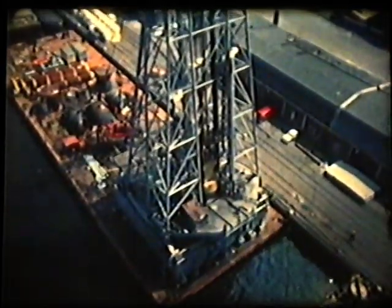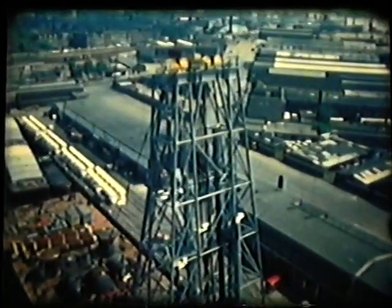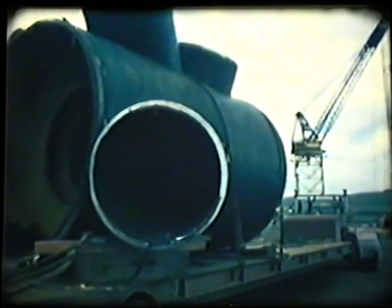Construction aids, such as the pile handling unit to cope with the giant piles at sea. Procurement of materials, the sheer volume and value of which is a staggering £60 million spent with 17 vendors for this portion of the project alone.